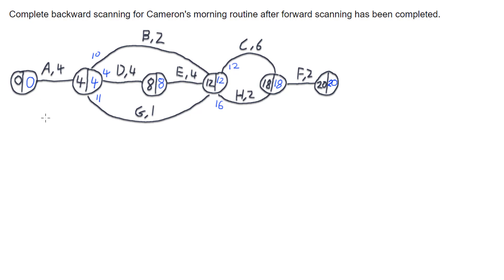I don't want to delay A because the project has started — what's the point of hanging around? So that's backwards scanning. It gives me the latest I can start A, the latest I can start the next three activities, the latest I can start E, the latest I can start the two after that, and the latest I can start F.